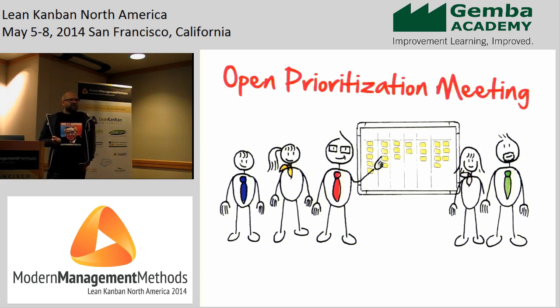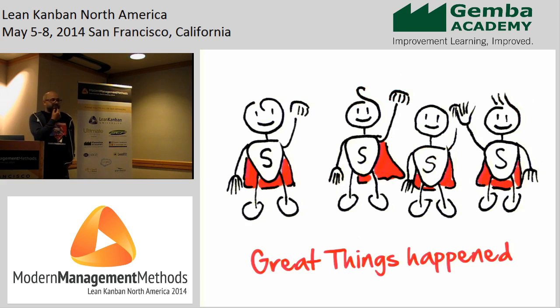And what we found out is that in this meeting, really great things happen. It's not only the queue thing that I was talking about, but other things as well. So in order to decide how many of these items can we accept, the team has to know what their capability is. So can we accept 2 or 3 or 5 or 10? They have never thought about this before, but now they're forced to think about it. The second really important thing is people walk into the office and they talk face-to-face with their colleagues from other teams. And that is really important because it creates understanding and trust. And that's why we are so keen on not creating tickets in our ticket system, but talking to each other in this meeting.